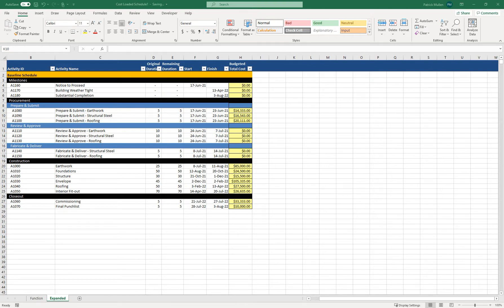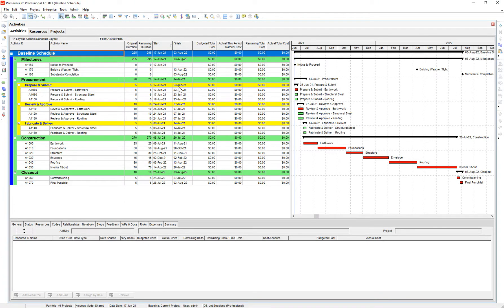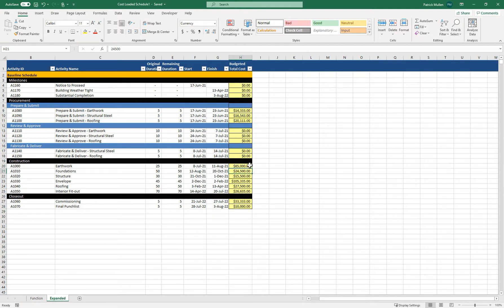Hey there, Rumblers. It's Pat from PJM Scheduling Services. Today I wanted to show you how to import costs from Excel into a P6 schedule file. I used to cost load schedules manually — I would take a schedule, copy and paste these activities into Excel, send it to the team, and the team would populate the schedule of values for each activity. Then I would manually enter those values back into the schedule, and you can imagine how long that takes on a schedule with thousands of activities. It was not a great way of cost loading, so I figured out a way to import costs from Excel into P6, and it made life a whole lot easier.